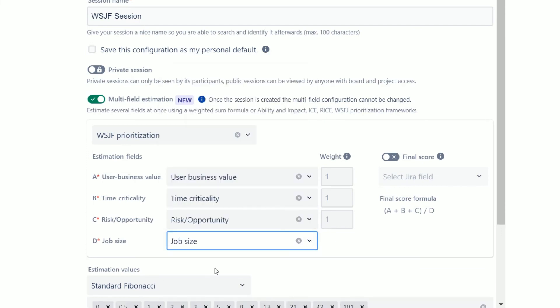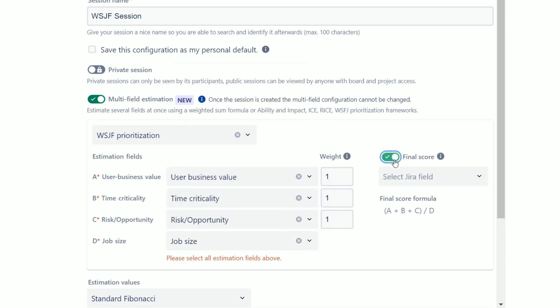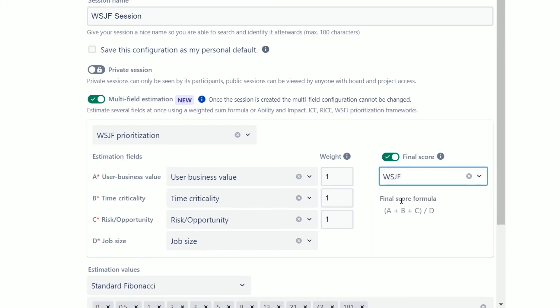Enable the final score toggle if the session's outcome should be calculated based on the estimates. Then select a field for the final score and optionally modify the criteria weights. The estimates and the final score will be saved in the corresponding Jira fields that you can use for future planning.